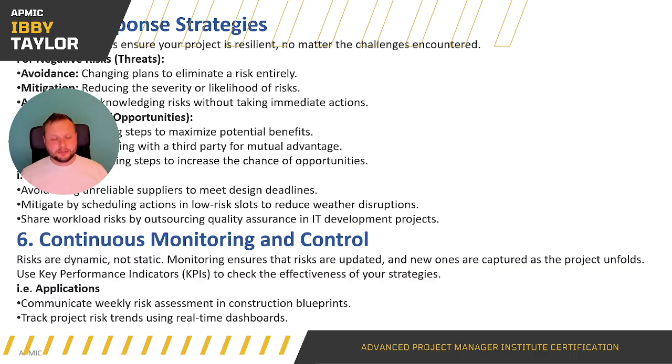Now, in some instances, there's going to be a risk with that because you might only have one supplier and they're unreliable. So you decide to use a new one. But a new supplier comes with its own risk because it's currently an unknown. It doesn't have those data points of are they successful or not. So that is its own risk in and of itself.